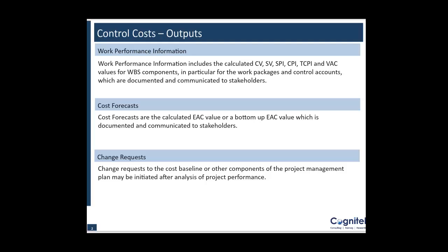As per PMBOK, anyone can raise a change request in the project. It's not just restricted to the client or the customer. It depends on the CCB, the change control board, whether to accept the change request, defer it or reject it. But as per PMBOK, anyone can raise a change request on the project.